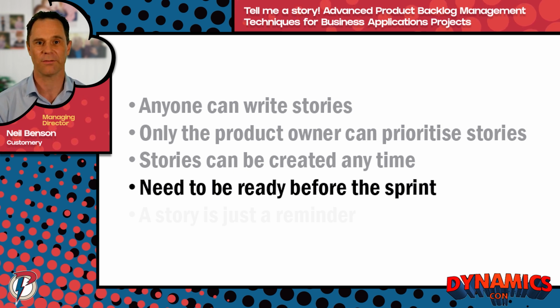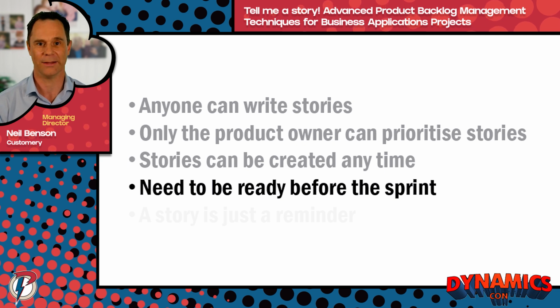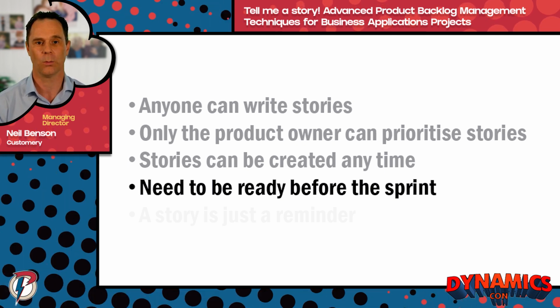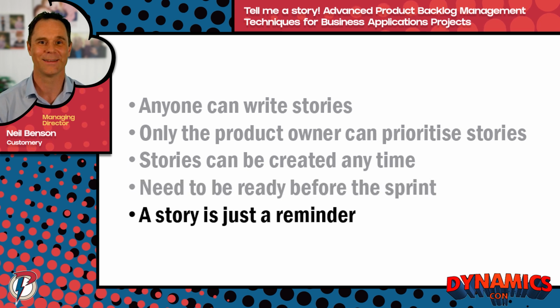I use a discovery phase before launching a new project to create and refine an initial product backlog. It could take a couple of days or several weeks, depending upon the scope of the project. Once the project starts, I recommend scheduling storytime workshops once or twice during the sprint to refine the next set of backlog items and get them ready for an upcoming sprint.